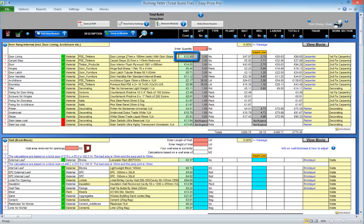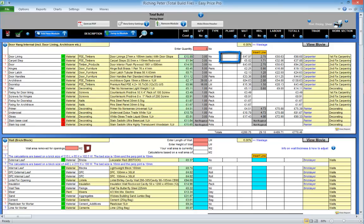Here is the unit cost. These are the green boxes indicating the prices come from the library. The quantity column is here. Any material costs associated with an item or task will go in this white box. Any plant costs will go in here.